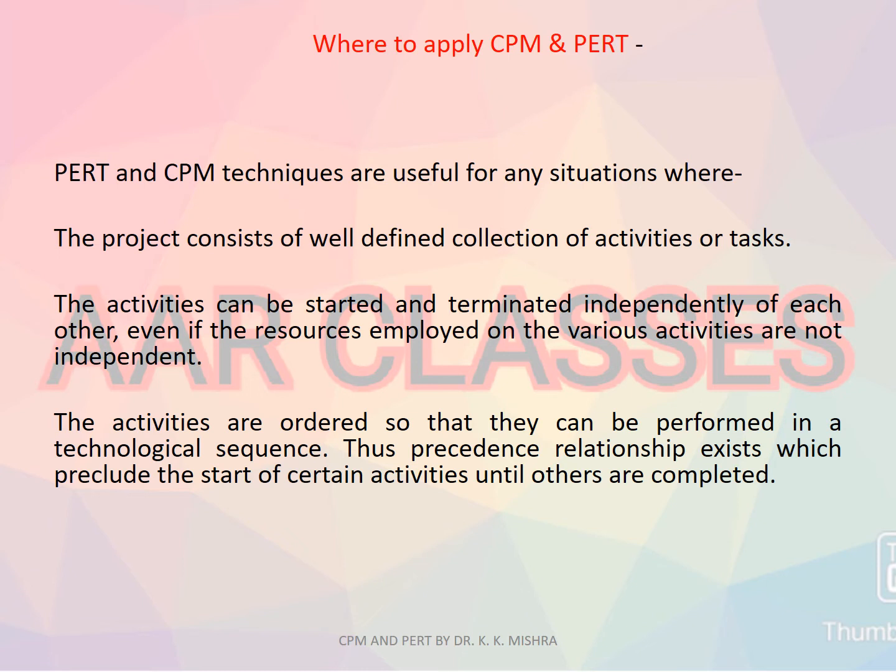The question is where to apply CPM and PERT. If you don't have a very clear concept about the topic, you won't be able to decide where to apply CPM and PERT, or in what situations these techniques alternatively are applied. So one basic difference I have already given you: in cases where time is not certain, we apply PERT, and where time is certain, we apply CPM.